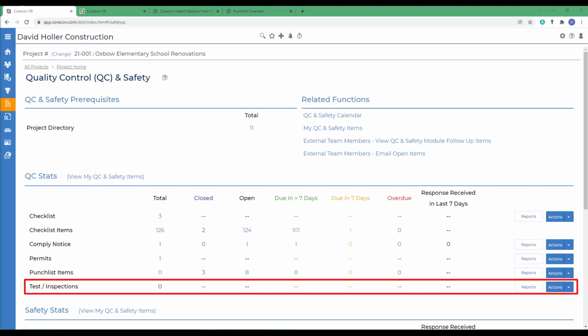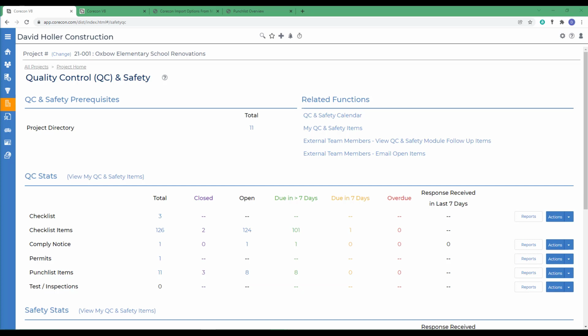The test and inspection header information can be entered at the start of the project for specifications. Then sample and test details can be entered as they occur. Remember to add the companies and contacts that can be referenced in the sample and test details to the project-specific project directory. Rather than entering this information manually, the company contact can be selected from that project directory.